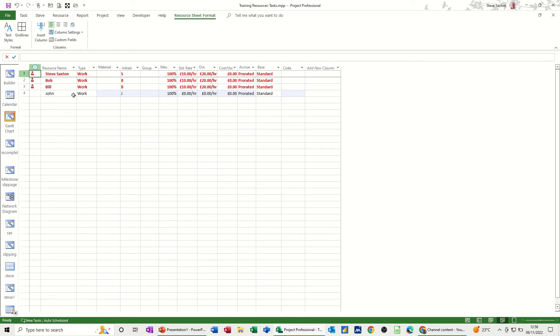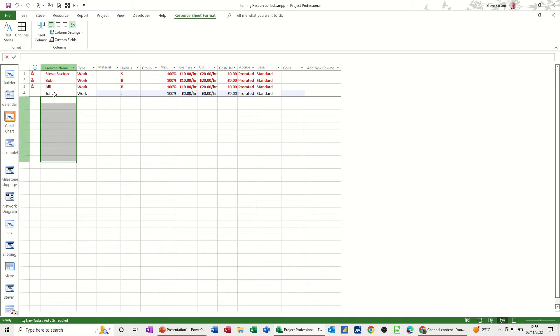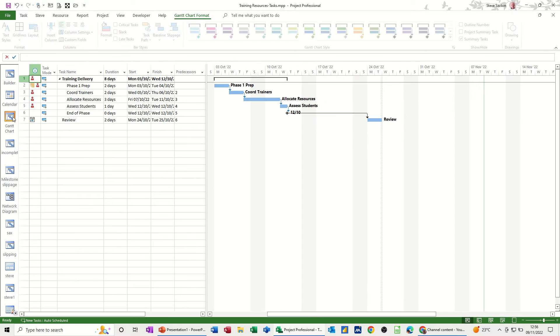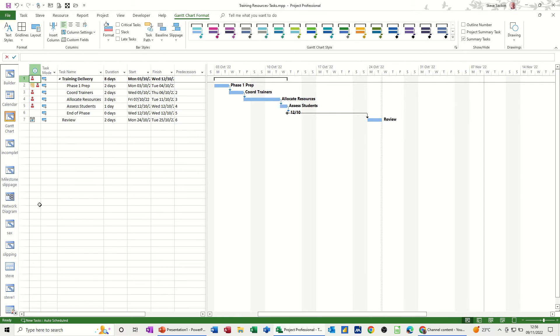I sort of advise people not to do this, because you can end up adding loads of resources that are duplicate. You might have spelt John slightly different without the H, and you end up having lots of things. So it's best, in my view, that you come into the resource sheet, create your resources here, and then allocate them either back on the Gantt chart or in the form.